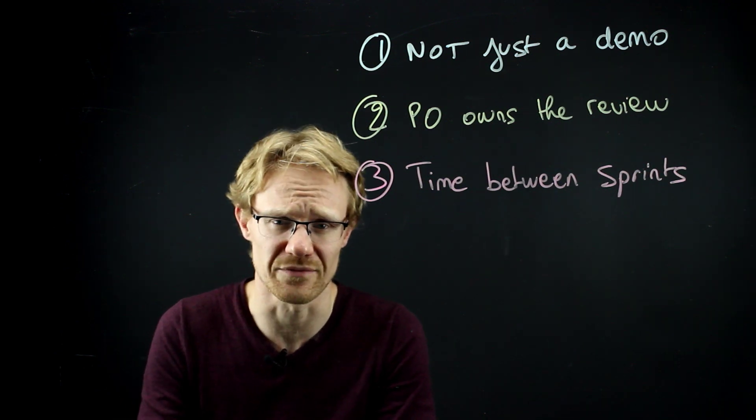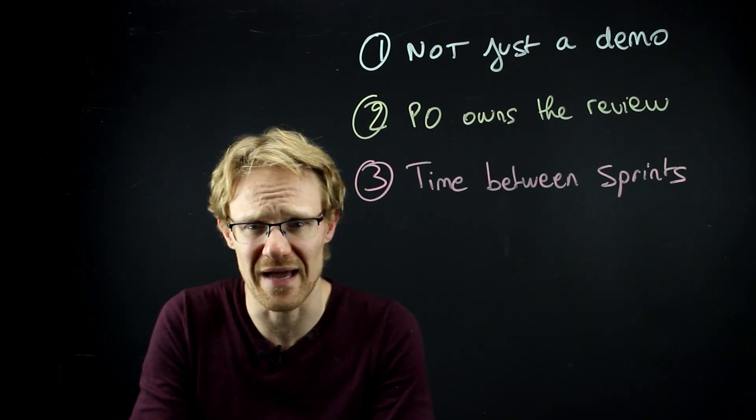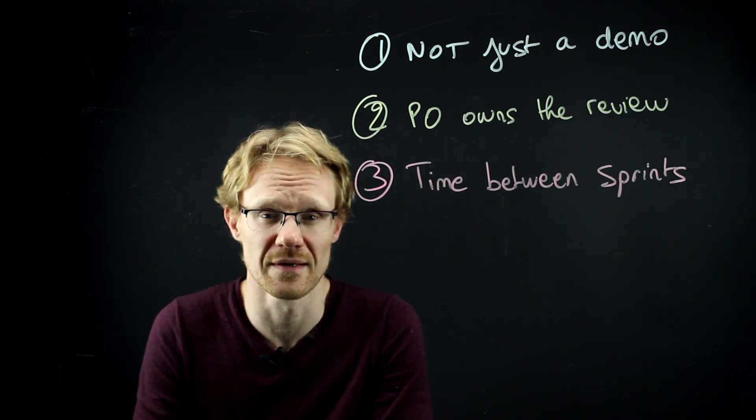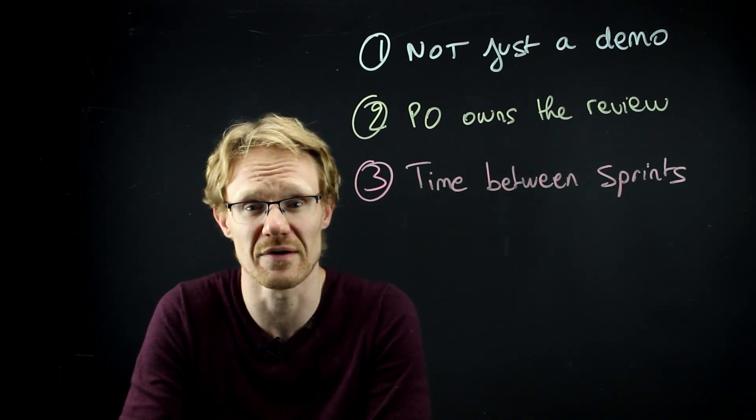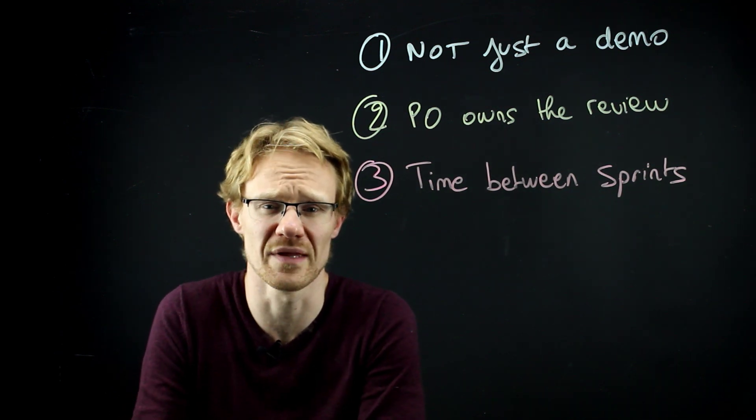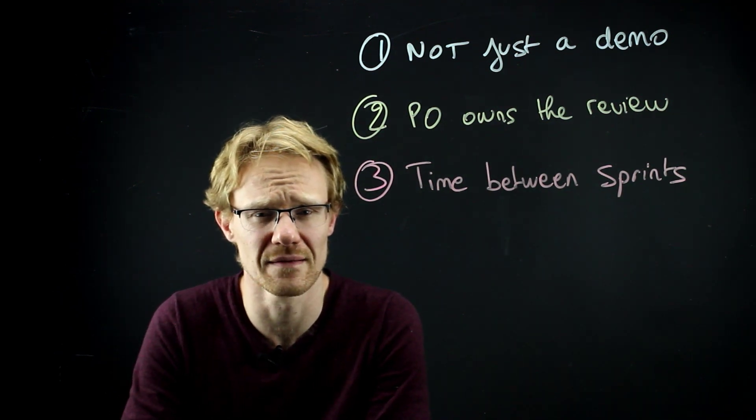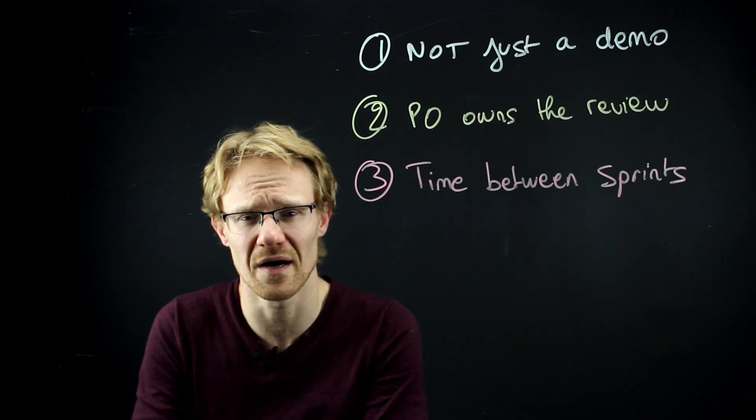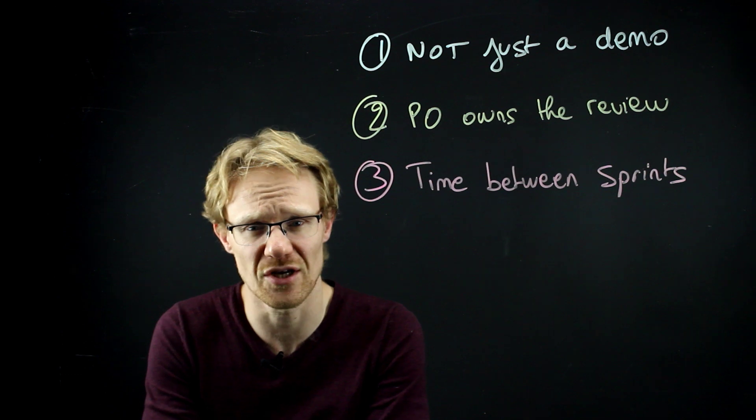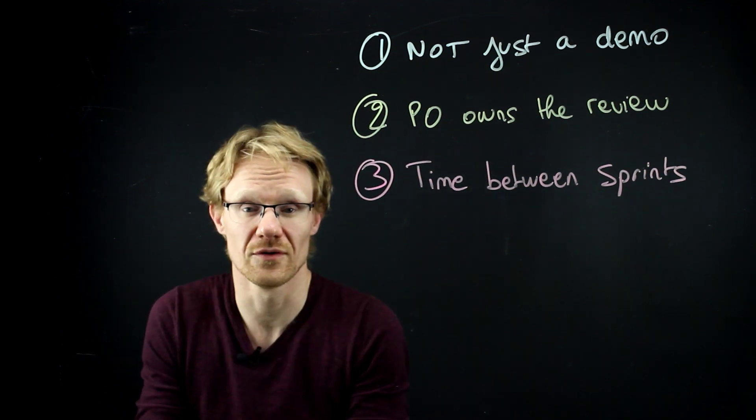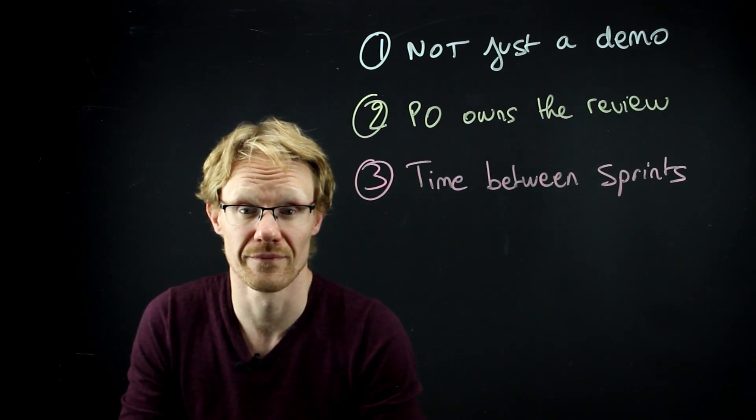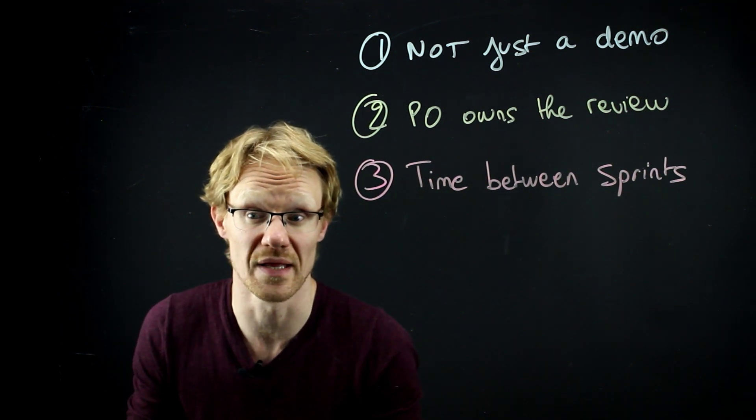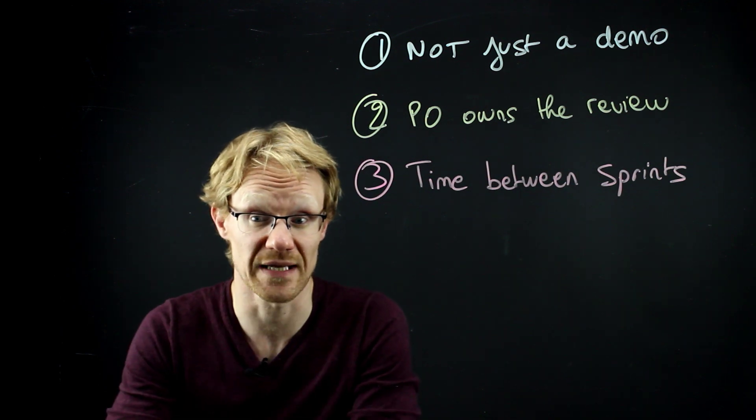Because you actually need to evaluate the delivery. And I'm not talking about the retrospective. I'm talking about evaluating the product. Is it fit for purpose? Did it actually help people? Did it bring value? You can't just assume that value has been delivered. You have to actually test it. So I'm not talking about having downtime. I'm talking about taking time to analyze and study what has been delivered. All of this takes time. There's no way around this. And you should really do all of that before you make decisions about what to do next.